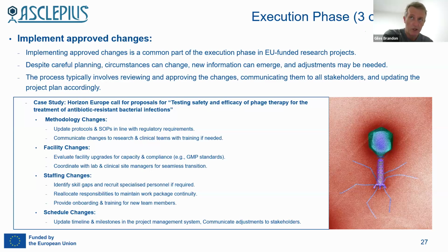If you have such a situation, in order to justify and get approval from the European Commission, it will be vital to convince the Commission that if the project isn't extended, there's a risk that one or more milestones won't be satisfactorily completed, and therefore the full impact of the project won't be achieved. If you can do this, then the Commission might allow a 6-month extension to the project.